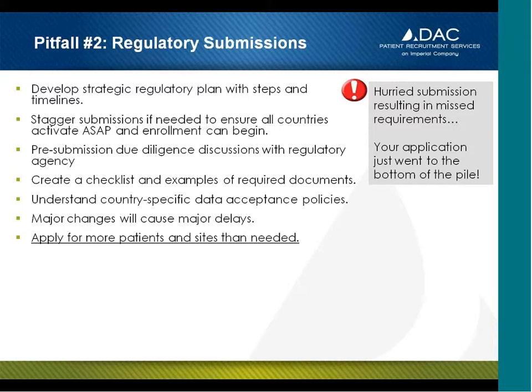We would recommend really mapping it all out on a Gantt chart or something similar, and then building in the buffers, as I mentioned before, because regulatory, frankly, is part art and part science, and from our experience, things rarely go as planned.